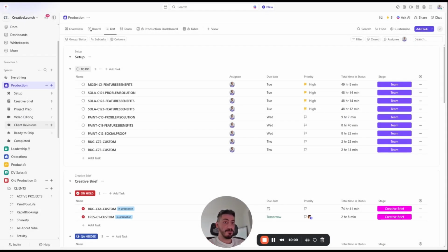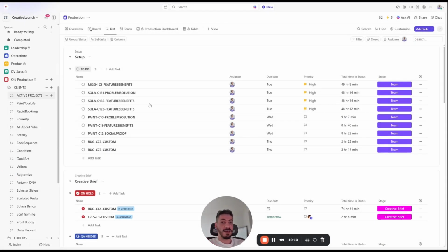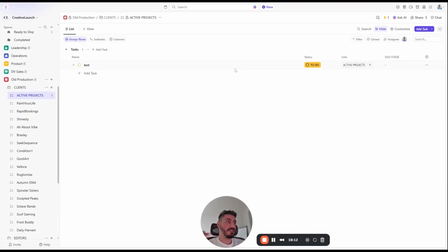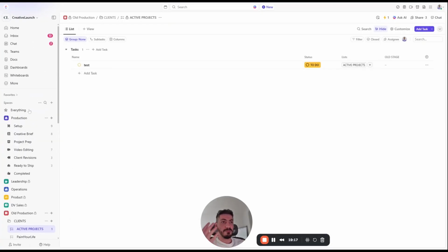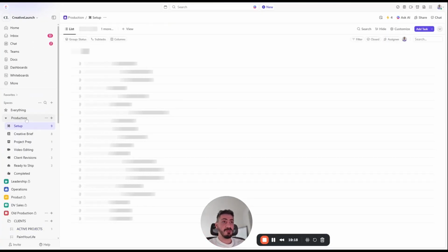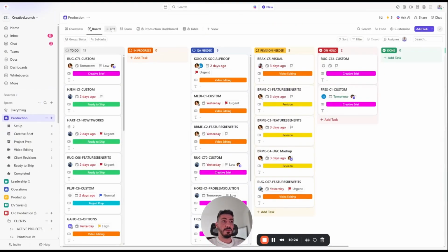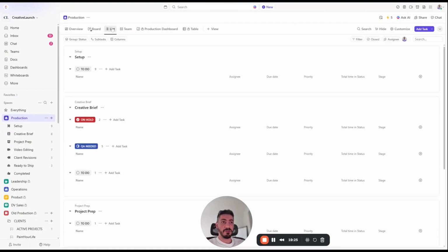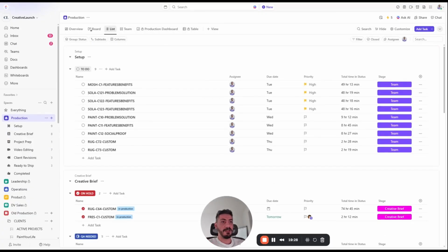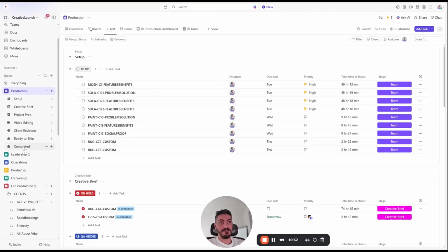From the project manager's perspective, who had to micromanage the task between the lists, freelancers, communicated back and forth, now what the project manager needs to do is actually do the setup. Whenever the project comes in, the project manager just decides the team who will be working on it, puts the deadline, makes sure information is there, passes it forward, and then the project manager checks it at the end when it's already completed.